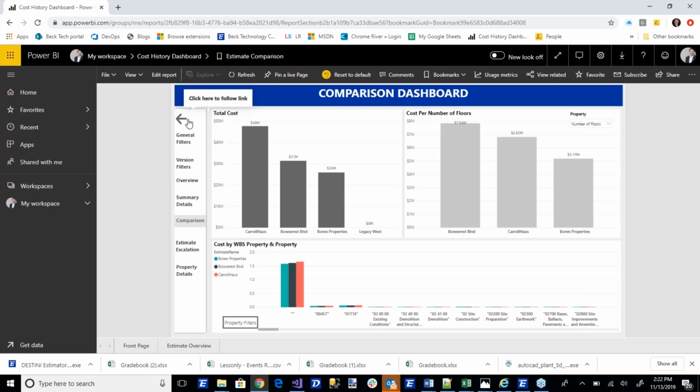But it is a full integration with Procore's documents and drawings piece, so you can use Procore as a single source of truth, as well as an integration with the downstream Procore financials, so that you can export and take your costs from Estimator to set the base estimate for the downstream field operations. And then even better, and stay tuned for this, it will not be in the next release, but it'll be something that we have been working with Procore on. We will be round tripping that information back into Estimator so that you can see the exact buyout cost for any one of your jobs and save it as a final buyout version of the estimate that you can then chart on tools like Power BI.